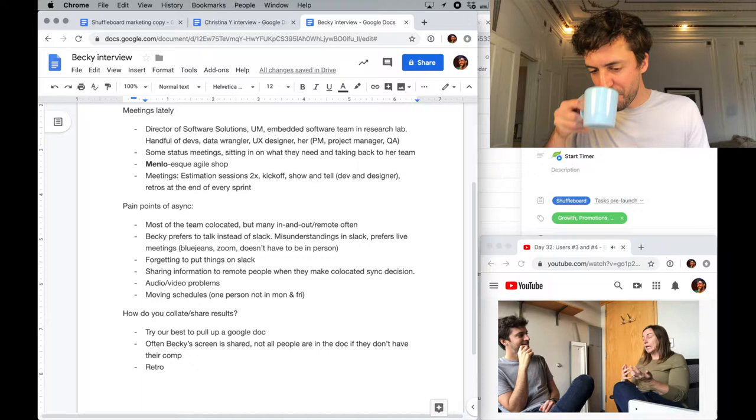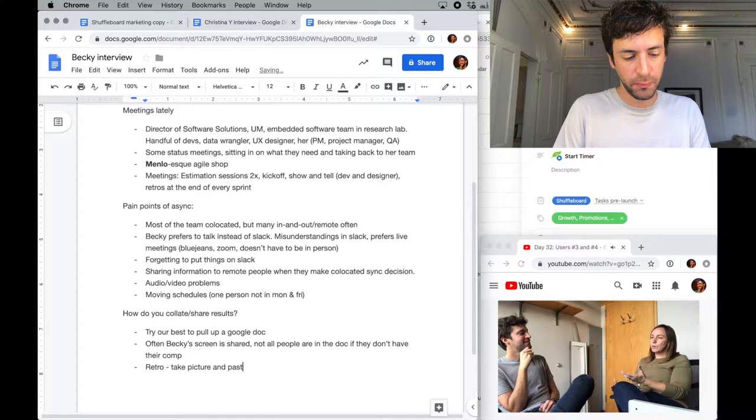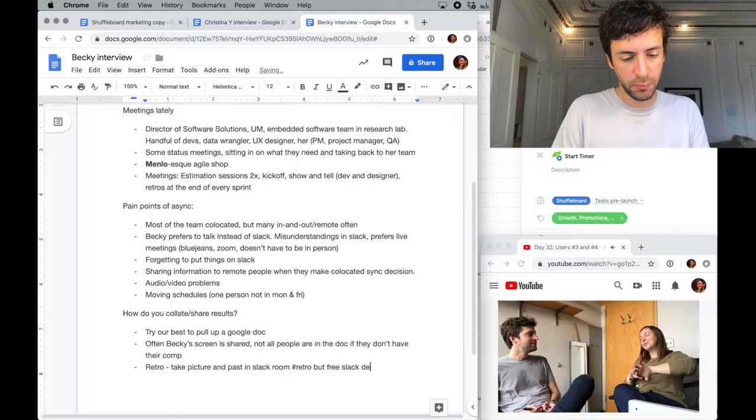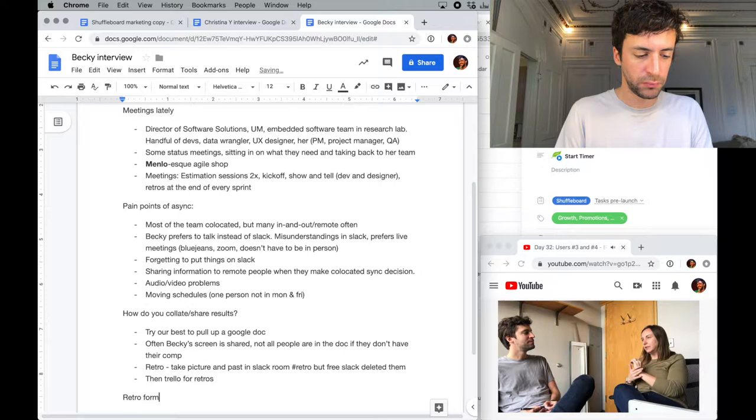Yeah. So then we switched, we opened up a Trello board for our retros, and we would make a card. Sorry, I guess I have to go on this little side tangent about the retros we run. Oftentimes, we used to run a version of a retrospective that in essence was what's going well and what's going not so well, and then pick a couple of those pain points to focus in on and make some action steps out of that, right?